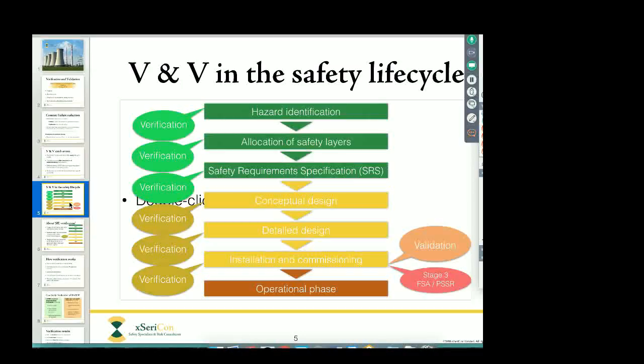Now there's lots and lots of detail missing out of this. It's just meant to give a very quick overview. And the major point I want to make here is, look on the left side of the screen. You can see verification happening at every individual phase of the life cycle, and that's how it's supposed to work. We do it, we verify it. We do it, we verify it. Step by step, one by one. And really we should not proceed through the life cycle from step to step until each step before has been successfully verified. That's really how it should work.